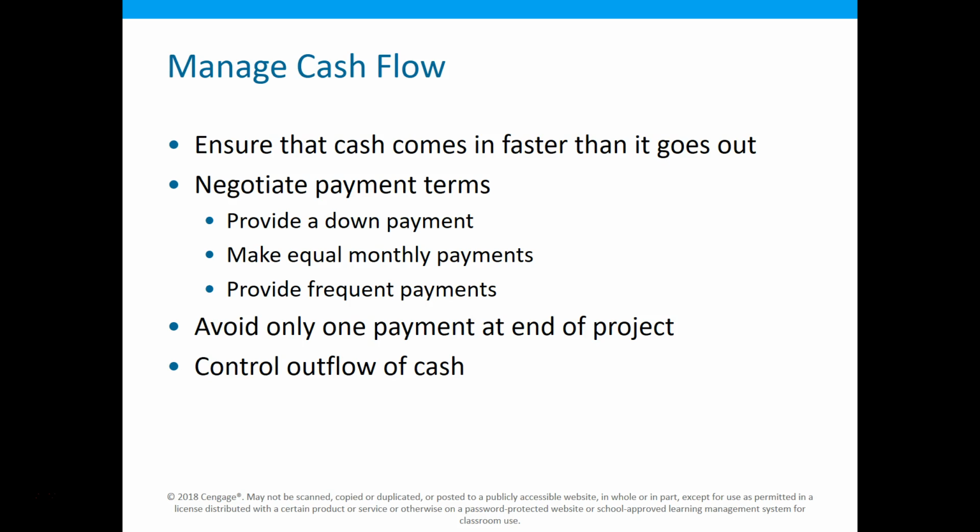If you've ever built a house, there are milestones along there. Walls are up. Building is what they call dried in, in other words, it's weatherproof, a milestone. And so we want to make those equal payments. We sometimes require a down payment. So maybe we have a down payment and that provides for the materials for our project or part of our project costing.